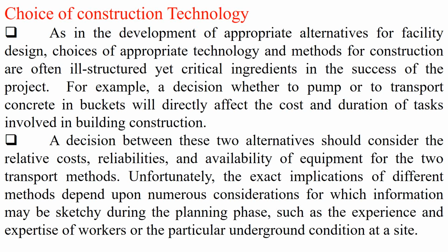In the development of appropriate alternatives for facility design, choices of appropriate technology and methods for construction are often still ill structured, yet critical ingredients in the success of the project. For example, a decision whether to pump or to transport concrete in buckets will directly affect the cost and duration of the task involved in the building construction.